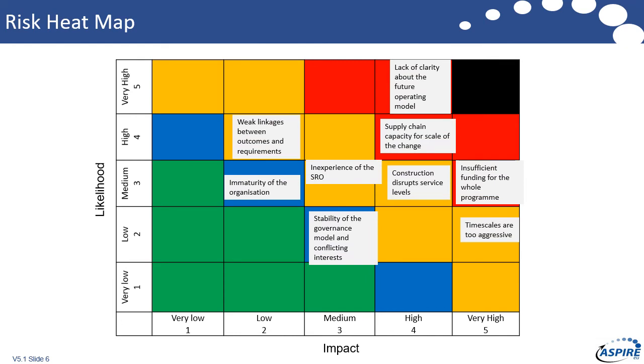And then we can float in, and as you can see, we've picked up about nine to ten risks. Float in, you map them together, and then you can start to see the overall aggregated profile of risk in your program, how it all fits together. Really helpful, very good for program boards, much more useful as a reporting tool to senior managers than putting in pages and pages of risk register. Those are important for the person managing the risk across the program, but for illustrating it to leaders so they understand how it fits together, this is much more useful.